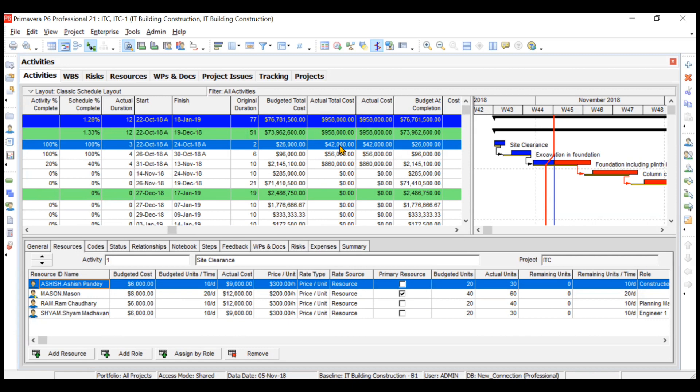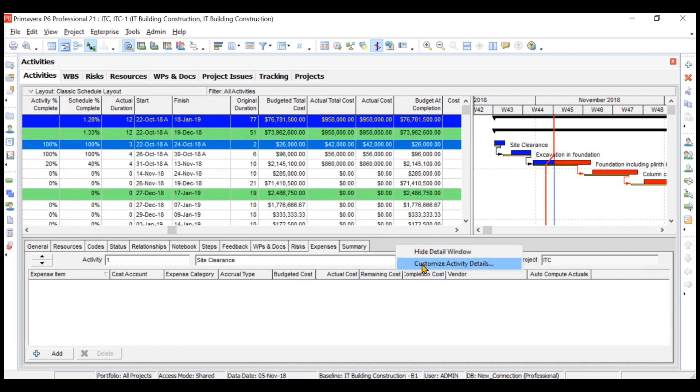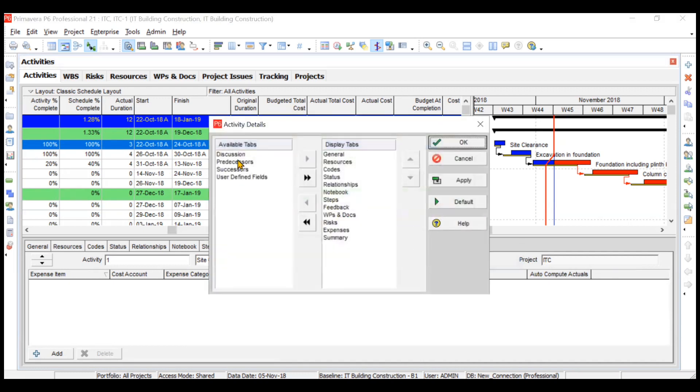But I want to add one more cost related to water and power or something else. How to add it? You just click on this activity, go to expenses in the activity details tab. If this expenses column is not visible, you can right-click, customize the activity details and move it here.